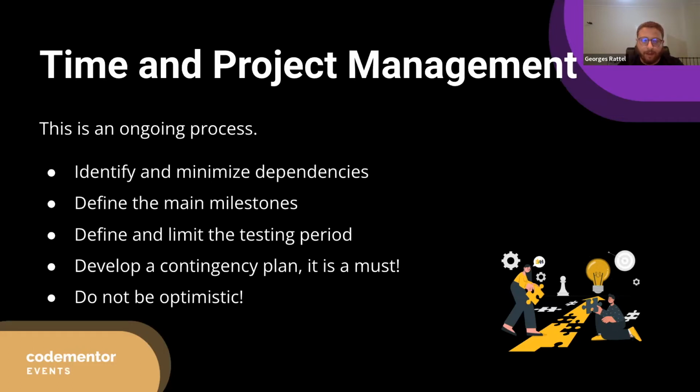We've actually done projects where we define the APIs at the beginning. The front-end developer works at their own pace. The back-end developer does a different sprint at their own pace. And then at the end of the project, it's as simple as switching from the mock APIs to the real APIs, and everything works seamlessly.